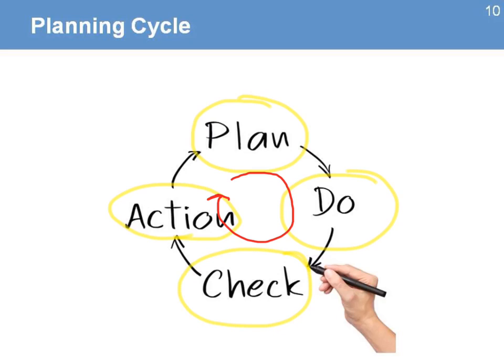You can do it every 3 months, every 6 months, depending on the length and the complexity of your project. But the idea is that planning is the concept. It's not just developing a plan, but a process of planning through the life of the project. And the closer you get to the end of the project, the less you're going to need to start making changes and updates. But at the early stages, that's when it's needed. Because you don't know much about what's going to happen in the project, there is a need to be flexible in your approach for planning.